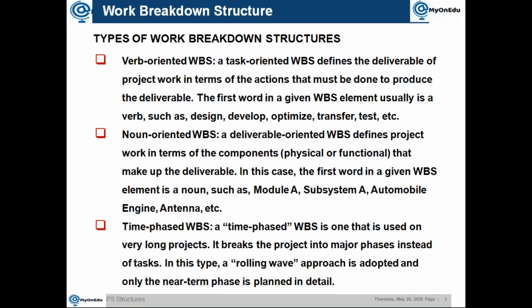Then there are different types of WBS breakdown. This one we can call a strategy. How do you use the strategy for WBS elements? Obviously, level 2 we don't need to think about twice. Level 2 will always be based on our implementation methodology, or you can say the project management methodology.